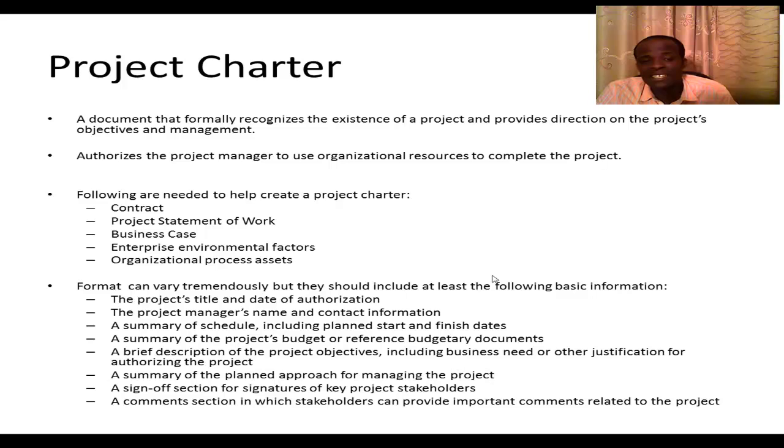As I said, the project charter in fact authorizes the project manager to use resources to complete the project. So in an organization, that gives the project manager the authority to use resources. Now, several formats exist. However, the following basic information are expected for project charters. 1, there must be the project's title and the date of authorization, that is when the project was authorized. The project manager's name and contact information should be provided.